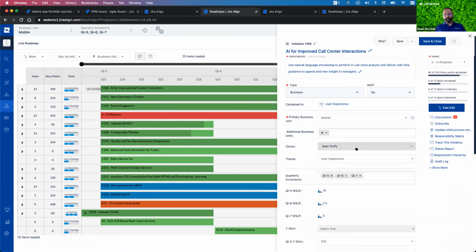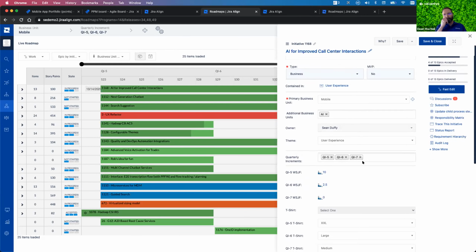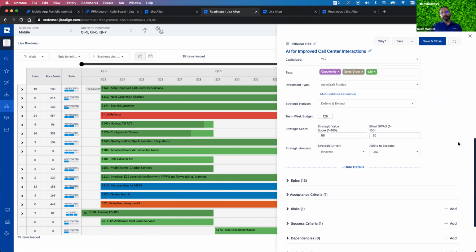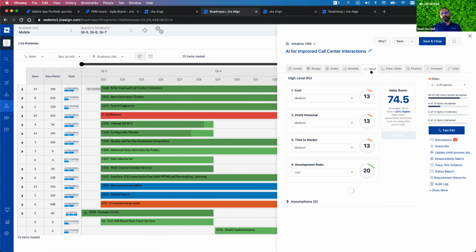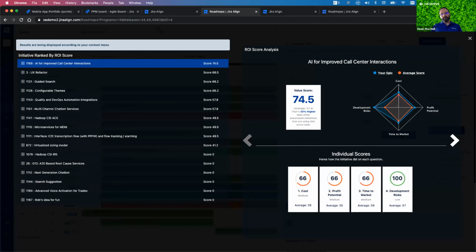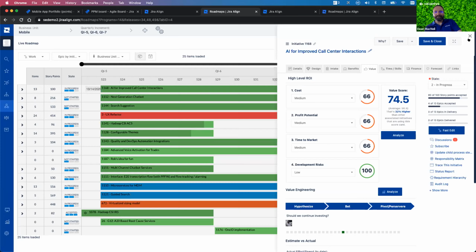Yeah, and you have a lot of different ways to visualize information and estimate in Jira Align, depending on the framework that you choose, and how you want to prioritize and estimate those different layers. At the story level, it is the story point, of course, but at the initiative layer, for example, you have different ways of prioritizing, and that can be as simple as a quick overview, a strategic score and a high-level estimate of effort, or that can be much more complex if you want to assess the value of different initiatives based on your own scorecards to have that level of priority and understand how you're going to manage that backlog. Jira Align allows you to create those different scorecards and actually compare this against other initiatives within the same realm that compete for the same people, money, and time as this specific initiative. So that's a very key element that Align brings to the table in a much more advanced way than anything you could do in Jira, pretty much.